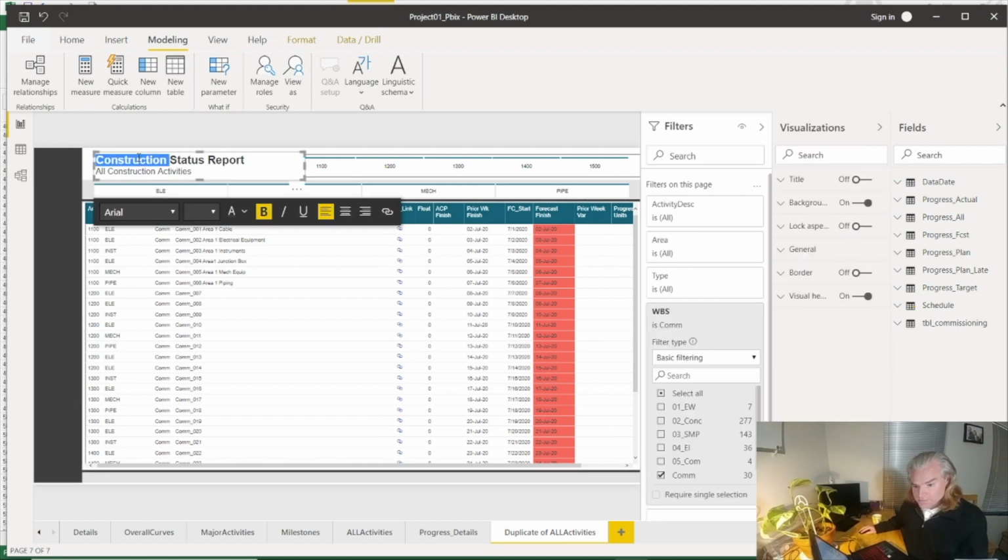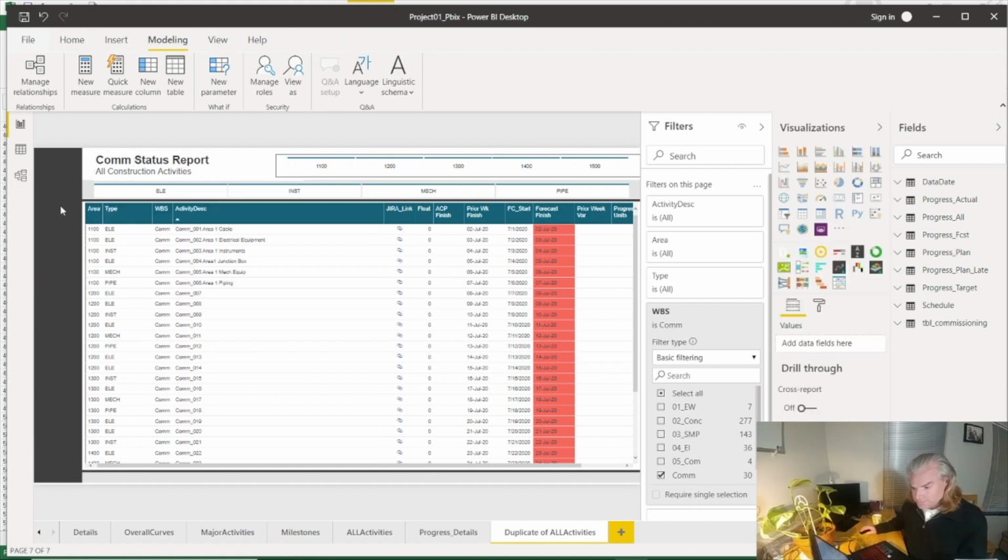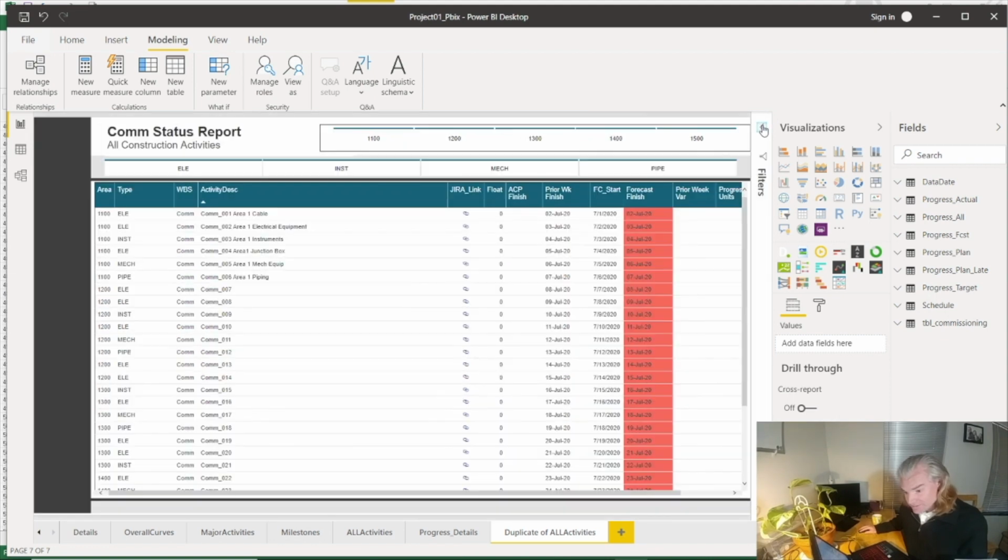And we can, let's go, the commissioning status report. I'm not going to worry about a lot of the details here. Now, we do know that these two tables are linked together. So the first thing that we want to do is actually pull in some count information. So for a particular item, we want some count of how many tests and how many tests are completed.